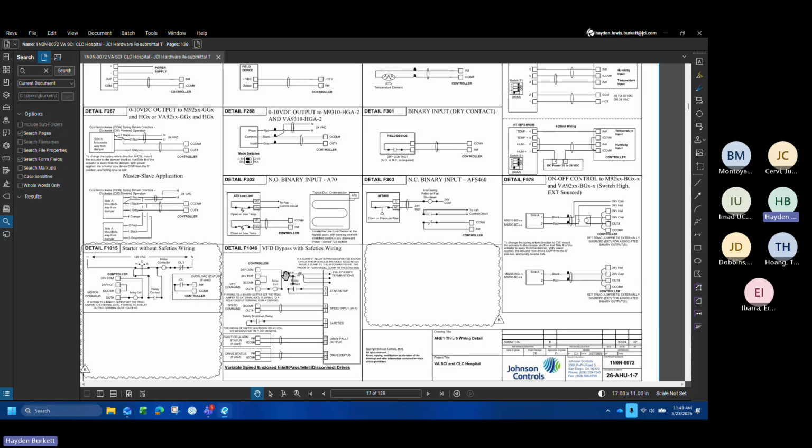This would have gone through the contracting tier, and I believe it would have gone to Army Corps. Yeah, it would have been submitted to the Army Corps, and then they would have forwarded it to appropriate parties. So I'm not sure who they sent it to. Usually the mechanical engineer, the DOR, would review this and give us his comments.